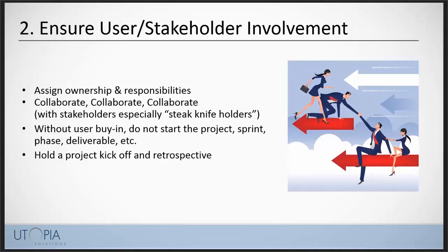So get those things knocked out. Map out your sprints and deliverables during that meeting. Get a clear agreement on the approach and process and who owns what, especially things like risks and the applications under test, deliverables, where possible. Try to get owners assigned to all of those things.